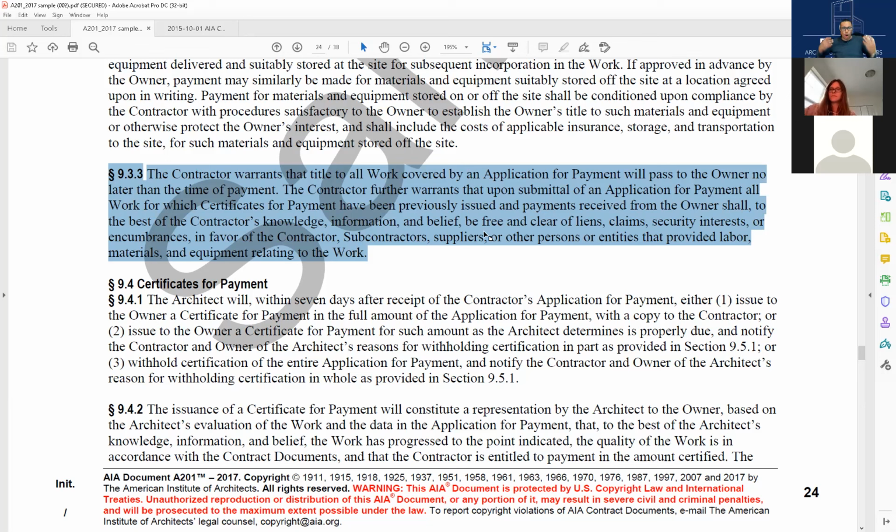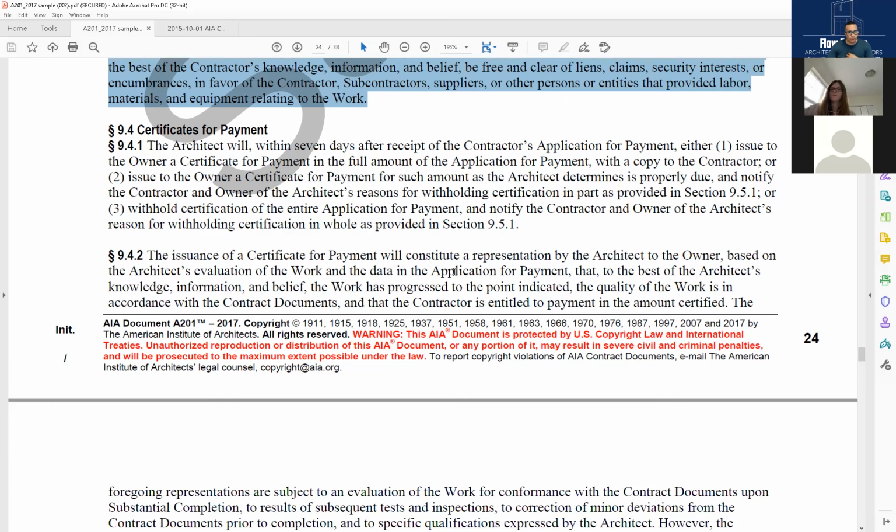They're just really giving a warranty over that work, saying it is yours and only yours, and nobody else, no sub, nobody else has any right over that. You've paid for it. It's truly yours. This is important because what if Jose and Jose Plumbing want to come back and say no, he hasn't paid me for it? Well, you deal with him, not with me. I own that. That's mine. And that's why we also get releases of liens and things like that.